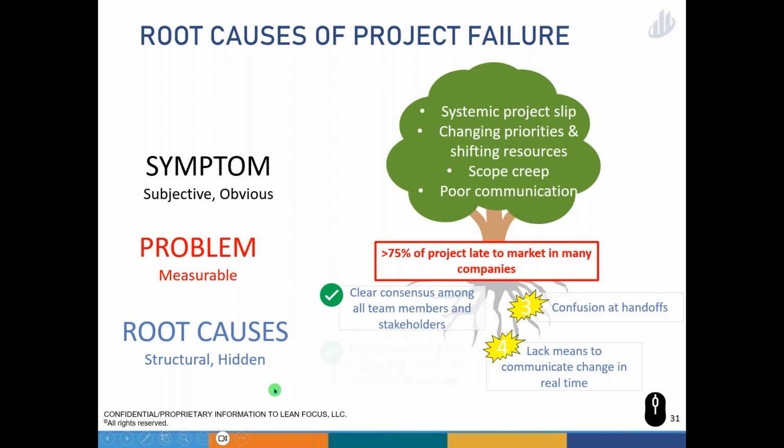The second thing is that we have a single point of truth, which is we have a workbook that has the details. We have a way to manage change now. So scope creep, what is scope creep? Well, you've got to go change the product workbook. And when you change the workbook, now you've got to go through an approval process because that document is owned by somebody. And so scope creep, I'm not going to say scope creep goes to zero. We always learn things and we adjust. And I don't think it's ever wise to turn your mind off to new information that comes to you, but scope creep goes down by a factor of 10 because everything's very clear on what you have to do to get it approved. It's not easy, and so people don't do it.